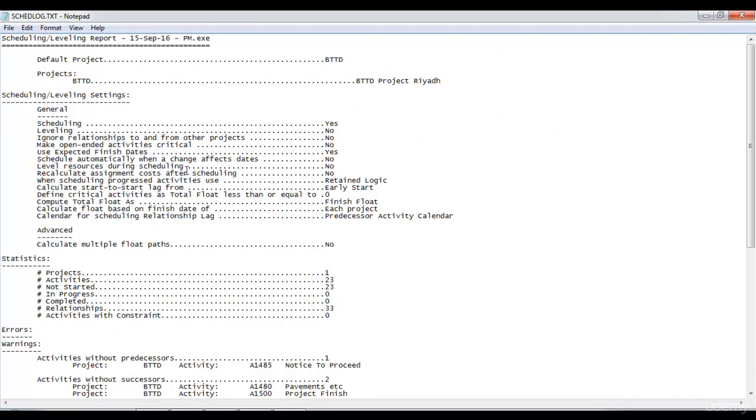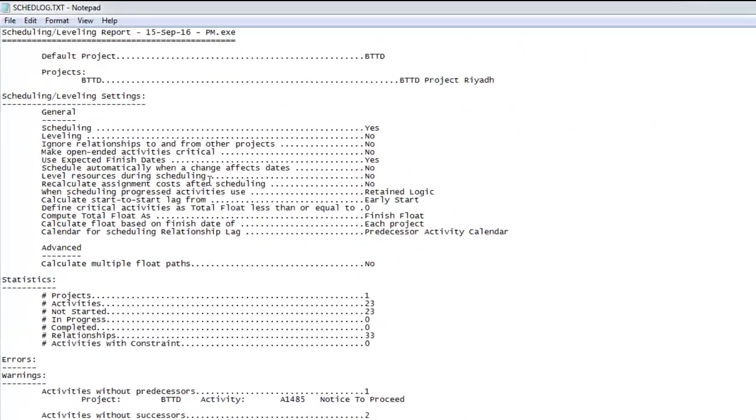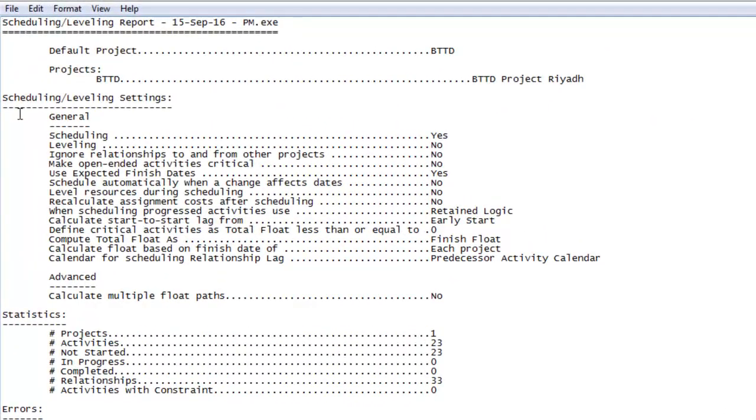The main information you should be concerned with in the schedule log is the scheduling or leveling settings. For example, if resource leveling has taken place in this project, it will tell us about that. It will also tell us about the scheduling option we have used, such as retained logic or progress override.